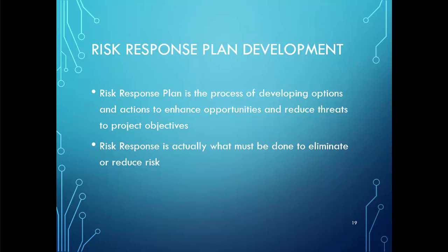A risk response plan identifies the primary components necessary for managing the risk. For example, what response strategy will be used? How will the risk event be detected and the response triggered? What plan will be put in place in response to the event? And who will be responsible for monitoring and controlling the risk?